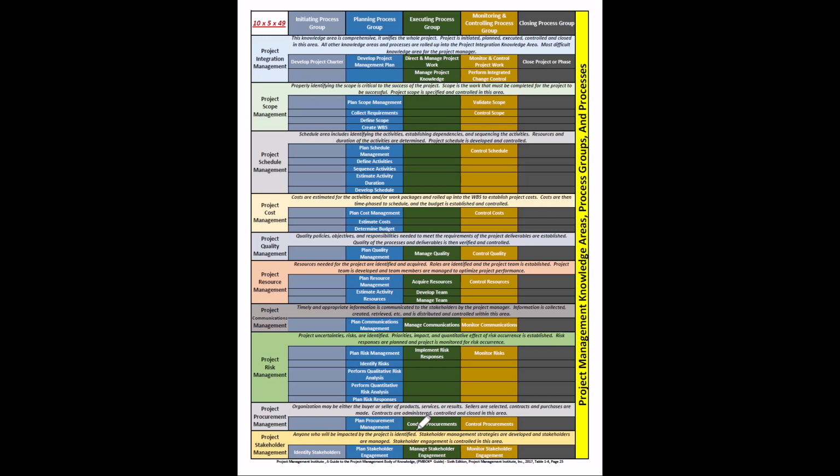I'll call them all in together, Zoom or however I do it, and they will have an opportunity to ask questions. We'll provide some of the boilerplate information to them, the contract expectations and so forth. But everybody hears the same thing at the same time. No private meetings. So I issue the RFQ. I hold the bidder conference.